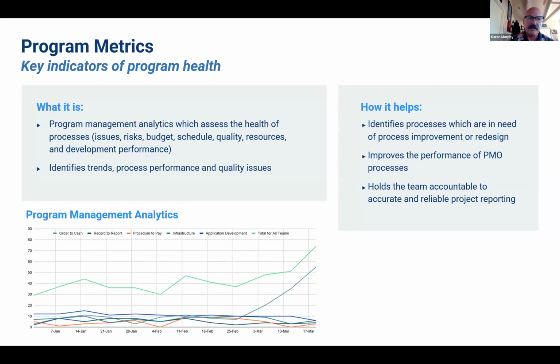The metrics can relate to the deliverable completion rate, obviously. It can relate to the project management processes like risk management, issue management, schedule, so all those different areas. But as you shift from one program phase to another, you'll have different deliverables, and you might have some different teams, some different processes you need to identify. So on the next slide, I'll showcase an example of metrics on decision making that Ray and I developed.